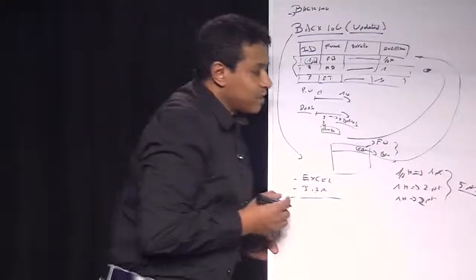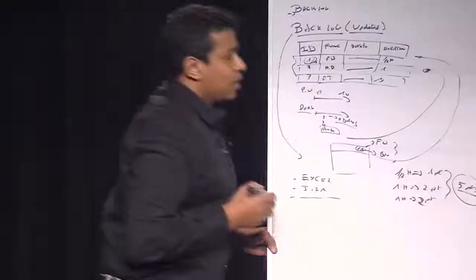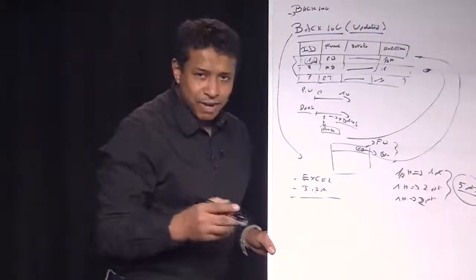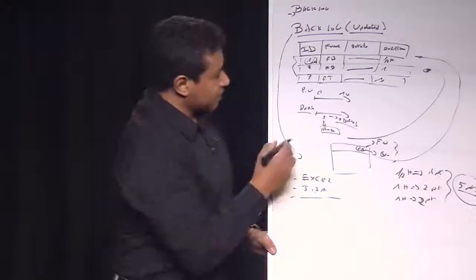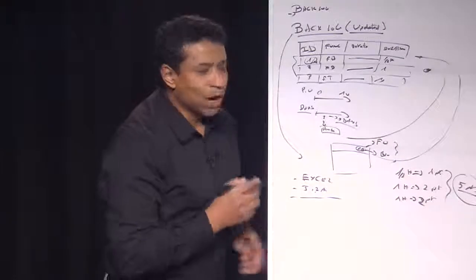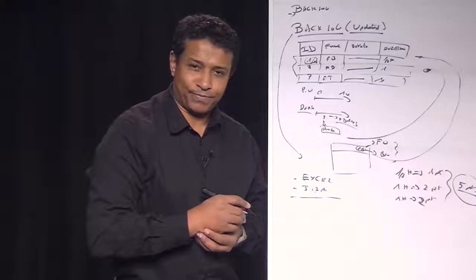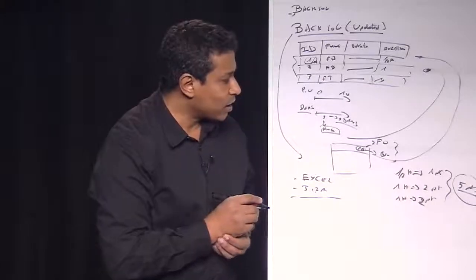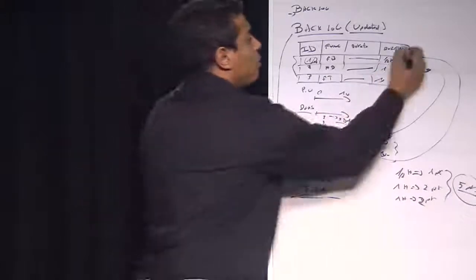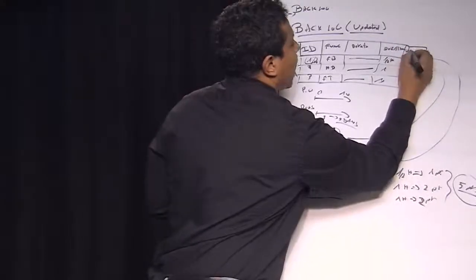It's important because with this I will be able to calculate and estimate the velocity of my devs. I will be able to know what charge they can use, what charge they can be in. So, in the backlog, now we can add a last column, which is the weight.